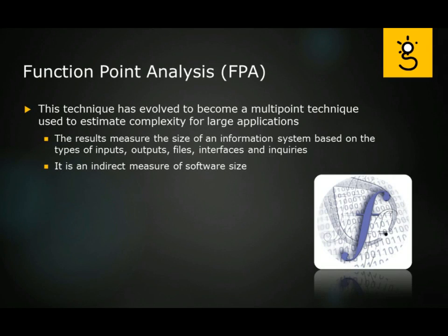One of the techniques we can look at is called the function point analysis. Now, this technique has evolved to become what they call a multi-point technique that's used to help estimate the complexity, especially for large applications. The results of this is to measure the size of the information system based on what type of input we're going to put in, what type of output we're expecting from this system or this program,